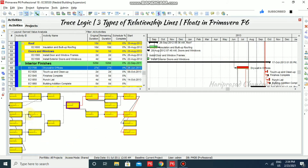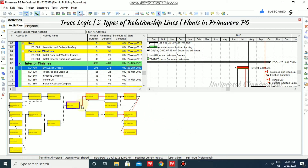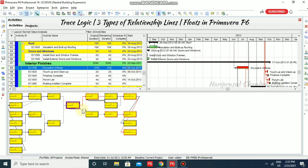Here we have black solid lines, black dotted lines, and red solid lines — so totally three relationship line types in trace logic. The first one is the critical relationship line, shown as red solid lines. These depend on critical activities, meaning the total float is zero. The black dotted line is called the driving relationship. Driving relationships have some total float and are used to calculate the start and finish dates of successor or predecessor activities, but they are not on the critical path.